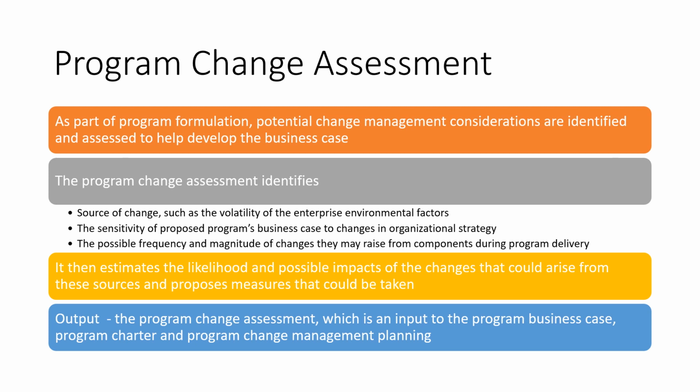At the end of this activity, the output is the program change assessment. It will come as a report or a document, which will be an input to the program business case, the program charter, and program change management planning.